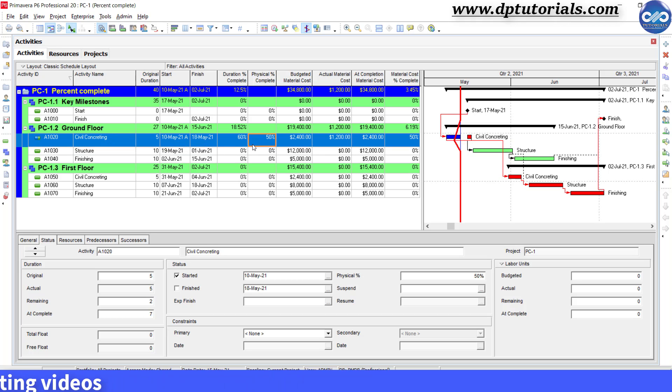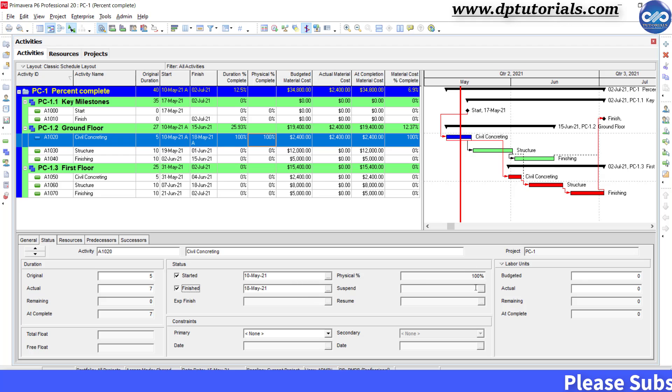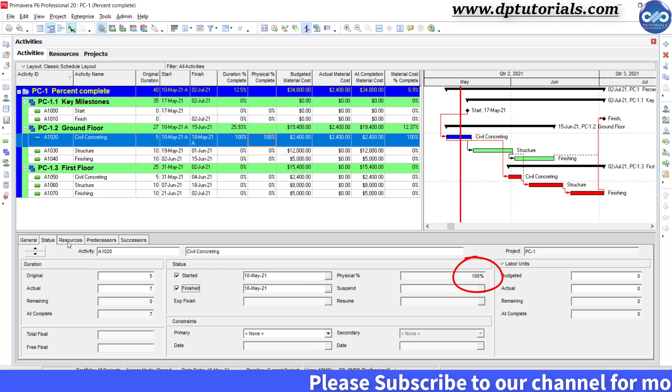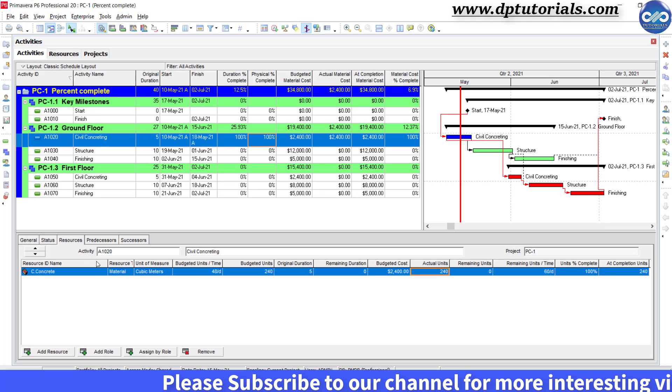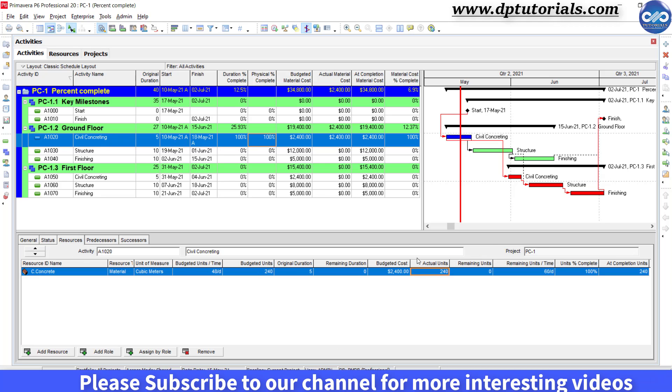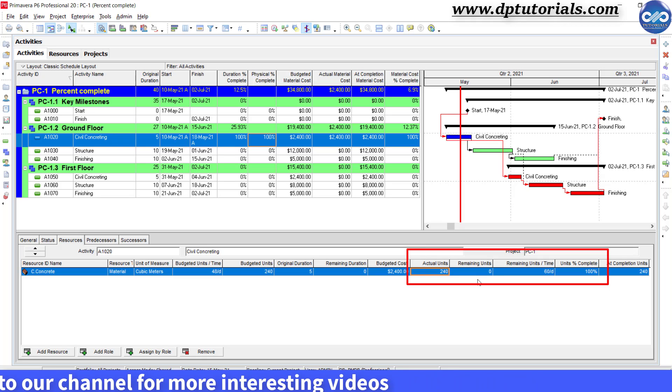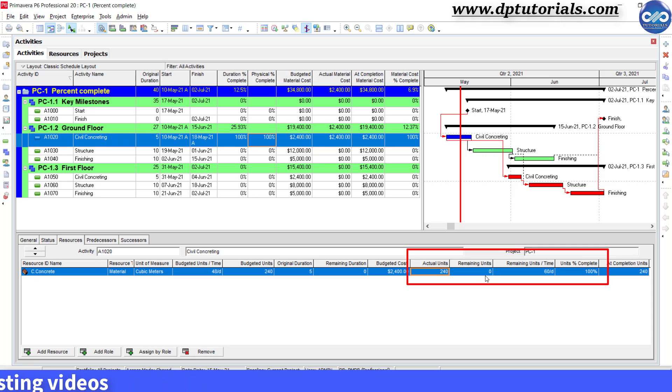Now, say after one more week, that is second week, you can again update the schedule and this time you tick the finished checkbox because it has been already completed. Now you can notice that the physical percentage gets updated as 100%. Go to the resource tab and see that the actual units have been automatically changed to 240 cubic meter and the remaining units got updated as 0. Also, note that the units percentage complete is updated as 100%.